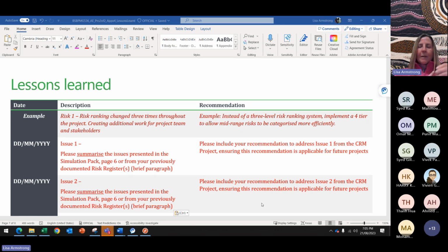Very good. Can I just say too, Ahmed, going back to your first recommendation, it is about contract management, definitely. Equally, with the clause with the supplier, we could even have an incentive, like a bonus if they have it ready early. So it's not all negative, we'll penalise you, but equally there is an incentive if they deliver prior to the date. That's why I was trying to add one as a penalty, and the other was to give them enough notice. Thank you so much for sharing. Fantastic. Brilliant.